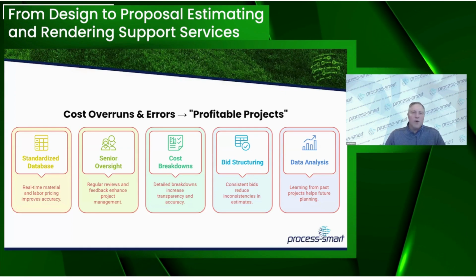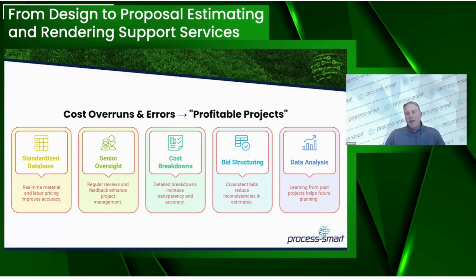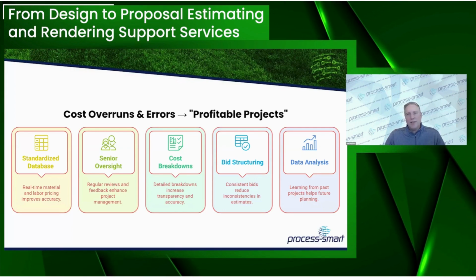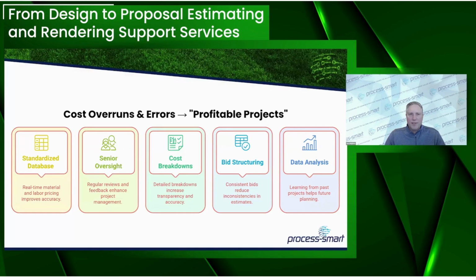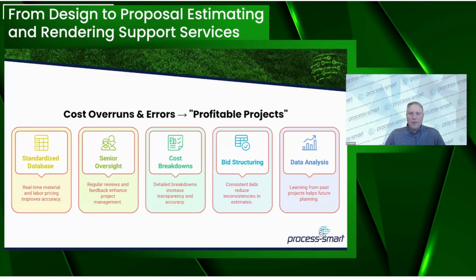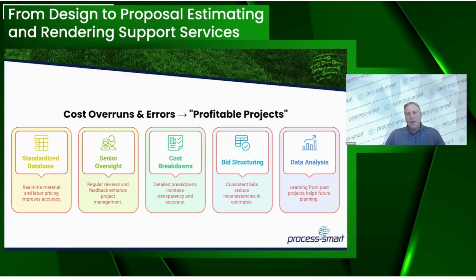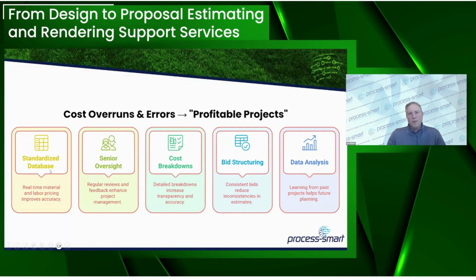And then the data analysis. You can't do the senior oversight, you can't do the after action review unless you're tracking this information. Again, you can use an ERP system. There's lots of choices there. If you don't have that, QuickBooks works fine. Just use it with Excel and track that specific type of item and line item profitability, so that when you have the discussion about why there was a miss, you can get to a specific answer.